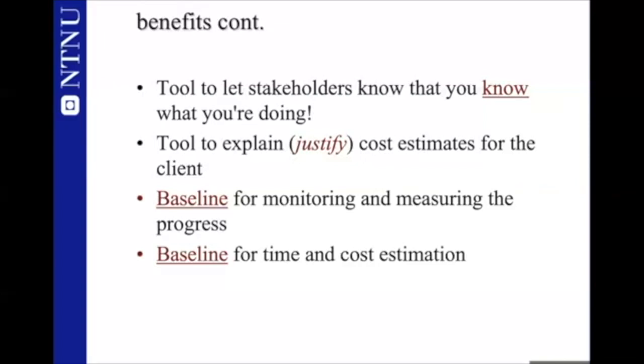And the client would say, no, that's expensive. We want a discount, or can you make it cheaper? They say, yes, we can make it cheaper. And they start with the client going through every element in the product work breakdown structure and say, for instance, okay, this is the rotor. A part of any electrical motor is something called the rotor, the one that is spinning around. And they say, the steel of this rotor, we import the steel from Germany, but we could import cheaper steel from an Asian country, for example. And if we change the supplier of steel from Germany to another country, we will reduce the cost by 500,000. Do you agree or disagree?